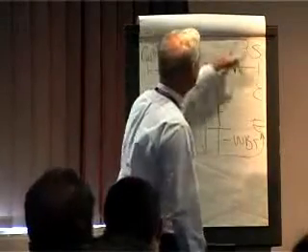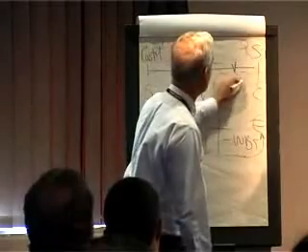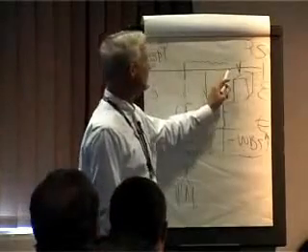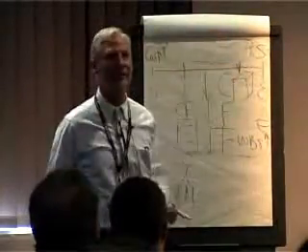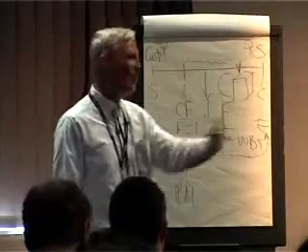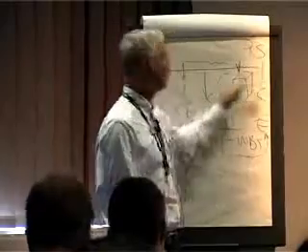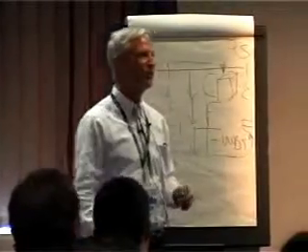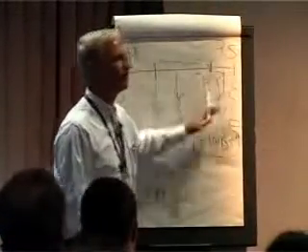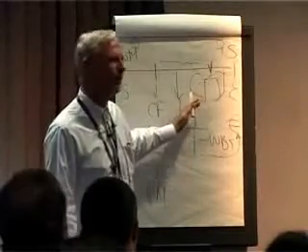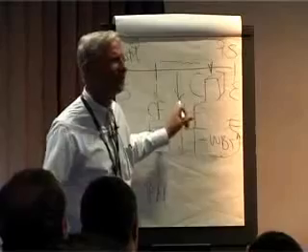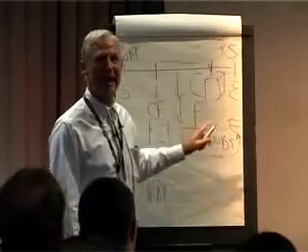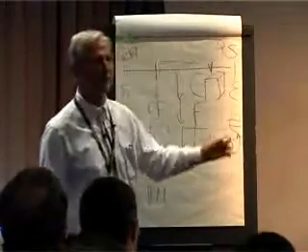And then at that point, what the teams do is they open up what I call the secret developer toolbox. And then after opening up the secret developer toolbox, they, quote, successfully deliver on schedule. Now, what's in the secret developer toolbox? Anyone who's been here knows. What's some of the things in the secret developer toolbox? Hacks and kludges. You can only deliver with 5 level A bugs, but you can have 15 level B bugs, and you've got 7 level A bugs, so you just kind of reclassify things. Reduction in review and feedback and pair work, all kinds of quality-destroying shortcuts.